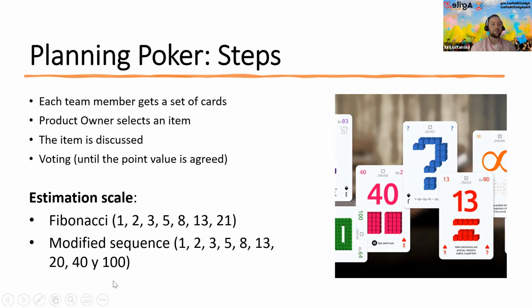So to me it's 13 points, basically because I don't have all the necessary skills to complete this, and I would require a lot more time compared to my senior colleagues. That's why we can't say there is a concrete number that would represent some middle range for the team; it depends more on the skills you have available on the team.